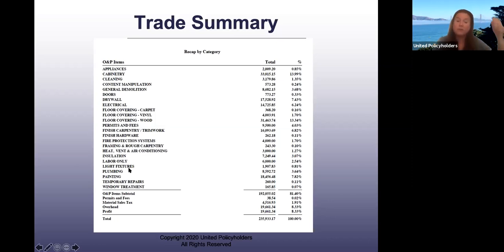So if they don't, like say framing, they're going to say, okay, well, we have a 2,000 square foot house and we've got these interior walls. So they're going to figure out how much of the materials you need, how much they're going to cost, and how much labor is going to be involved in putting them up. So then they're just going to give you a framing bid.